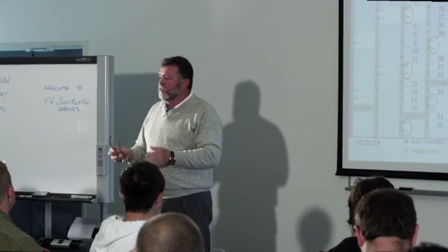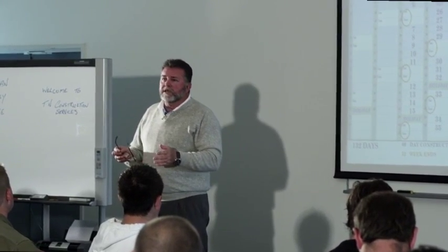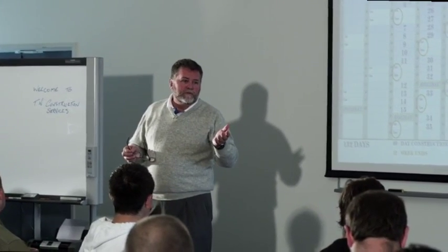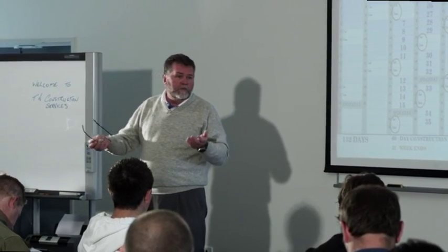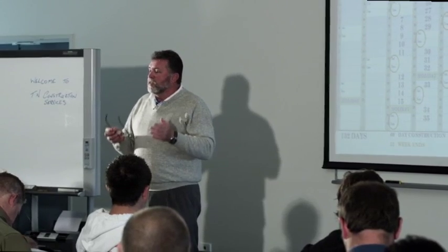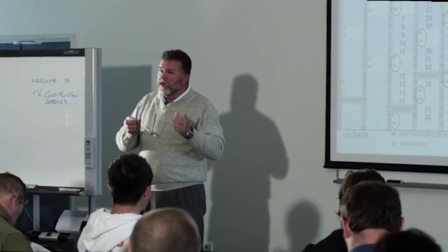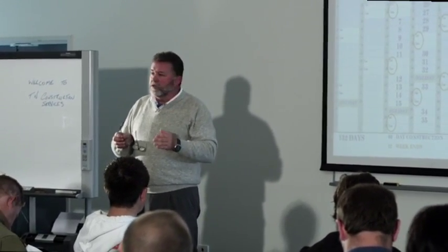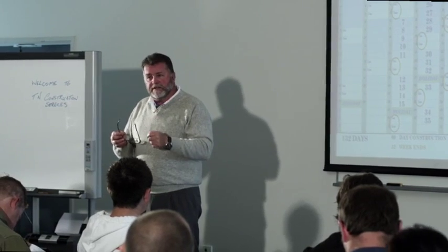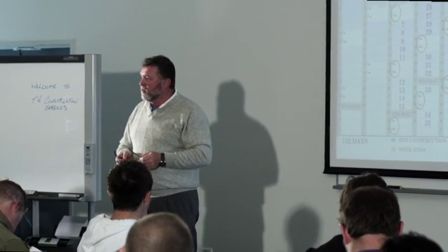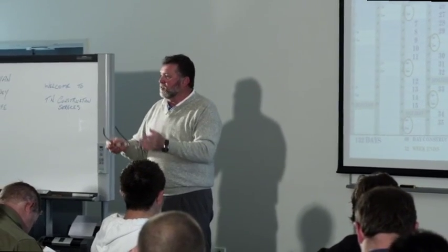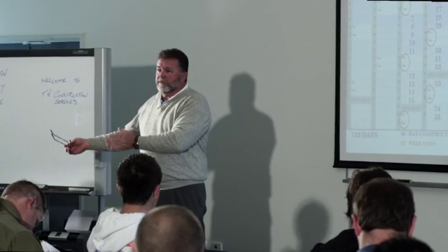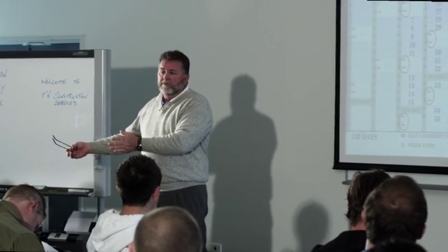delays due to imported materials. Why would I say that? Well, literally everything is just about imported, whether it be your toilet suites, a lot of timber, anything. So you've got a situation where the contract also says what is the effect that delay is going to have on your contract? The simple answer is it will extend the practical completion date. That's the effect it's going to have.